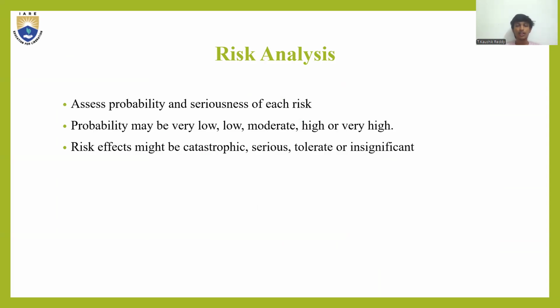Risk analysis: how do you analyze the risk? Assess the probability and seriousness of each risk. Probability may be very low, low, moderate, high, or very high. Risk effects might be catastrophic, serious, tolerable, or insignificant.